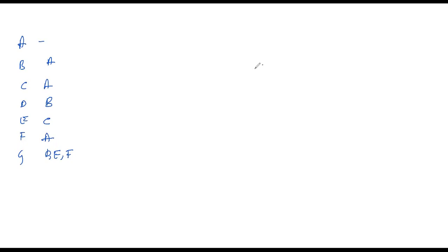Okay, A is the beginning activity. Activity A does not have a preceding activity, so that is the beginning activity. Next, B and C can start after the completion of A simultaneously. This is B and this is C. And activity E has to start after the completion of C. So C will be complete here, so we can start E like this. This is activity E.